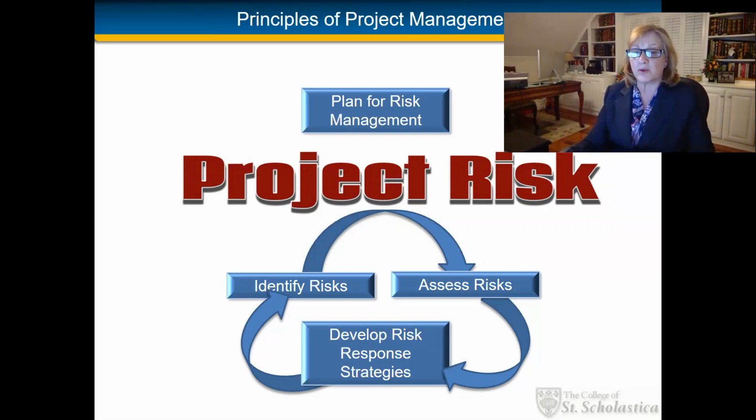Now, whether our risks or uncertainties are positive or negative, we need to ensure that all key stakeholders understand the probability of the risk occurring and the level of impact the risk will have on the project, all within the terms of the project objectives of cost, time, and scope or quality. So a risk assessment of medium impact needs to be clearly defined. Medium impact to cost, time, and scope or quality could have three different meanings to three different stakeholders. This assessment scale should be clearly defined in the risk management plan.